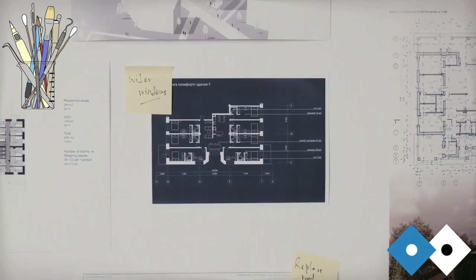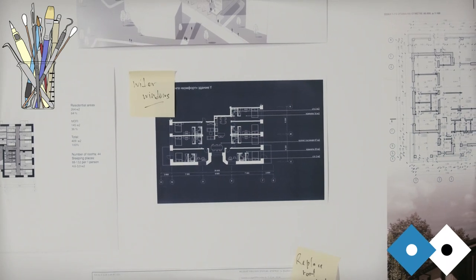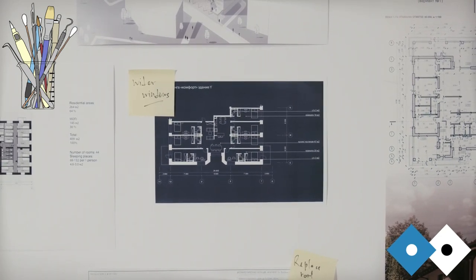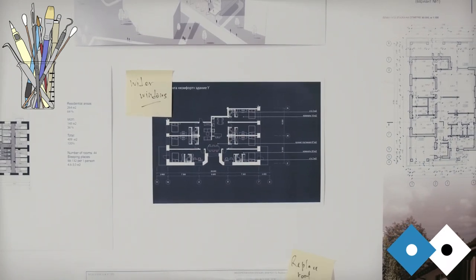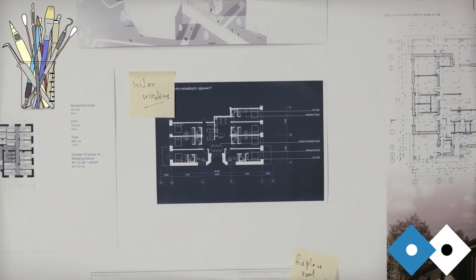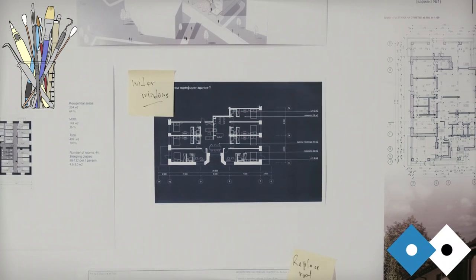Amazing. So we have to coordinate all of this, and everything comes together in the last week of February, when all of these people who've never been able to visit and have never met descend. On the same day, on the same week, and coordinate all of their various work strands. And during that last week of February, we're going to be putting all of those complicated displays of motorcycles and leathers together. And I think I might try and get some annual leave about that time, so that I'm not here for it.